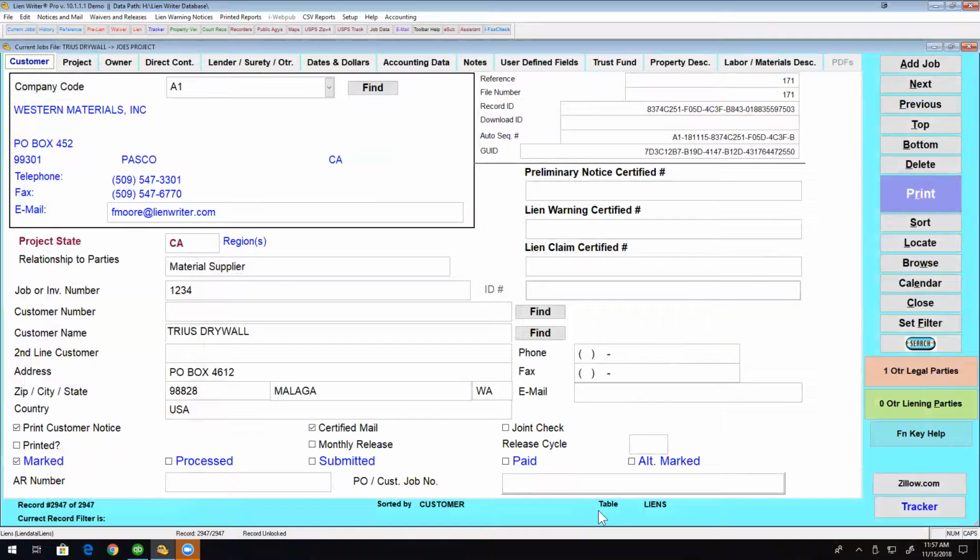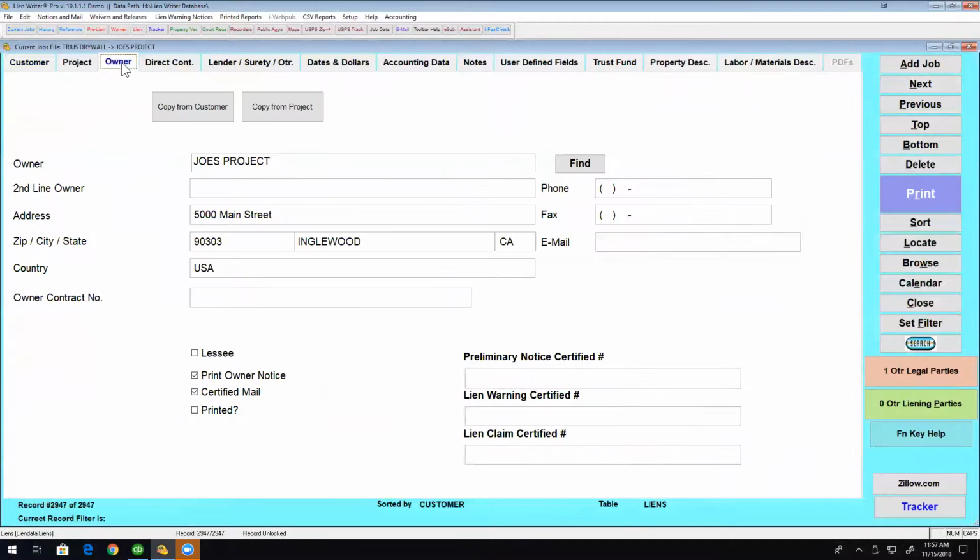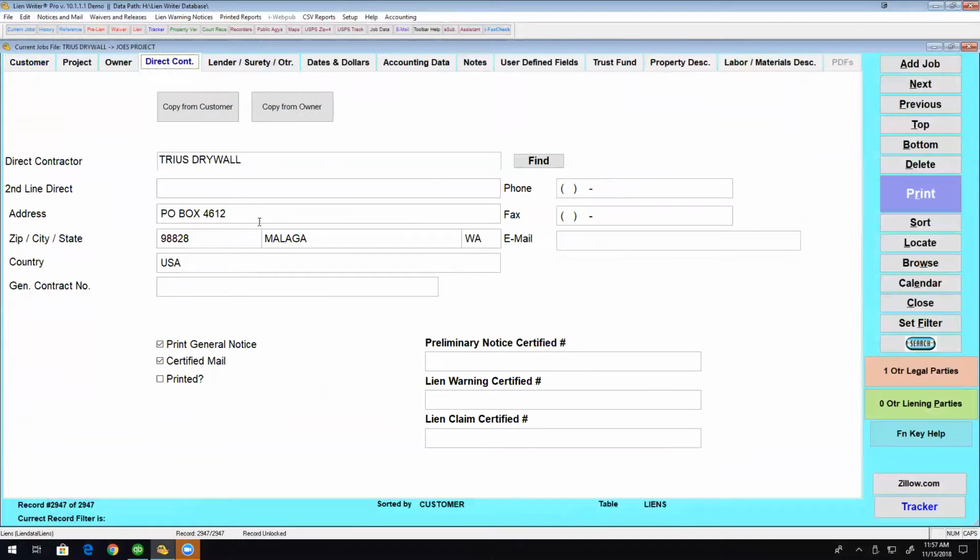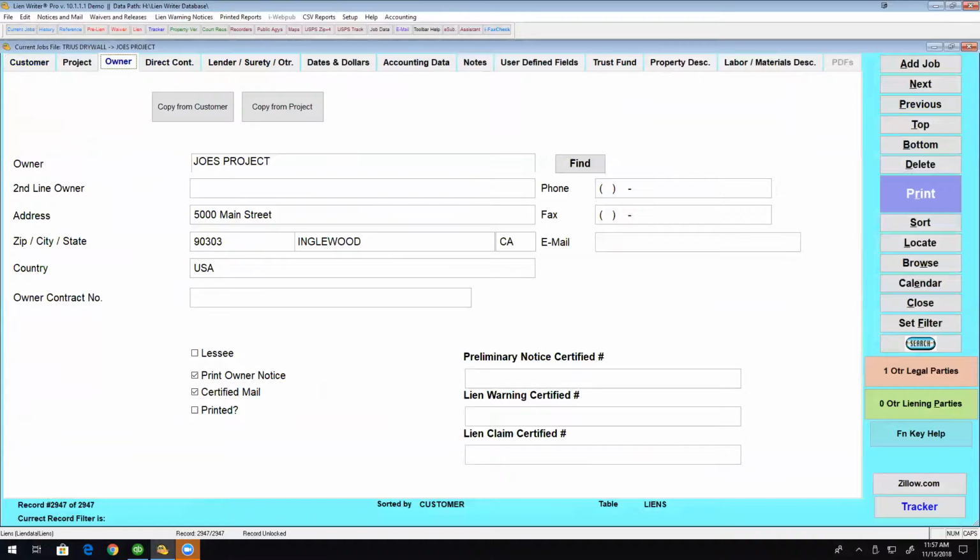You can't go after them specifically to recover that money. Now, can you get to the customer? Sure you can. Not anything. But you want to have that 20-day notice because this binds this guy in iron. Your notice is good. He's got to make sure you get paid.